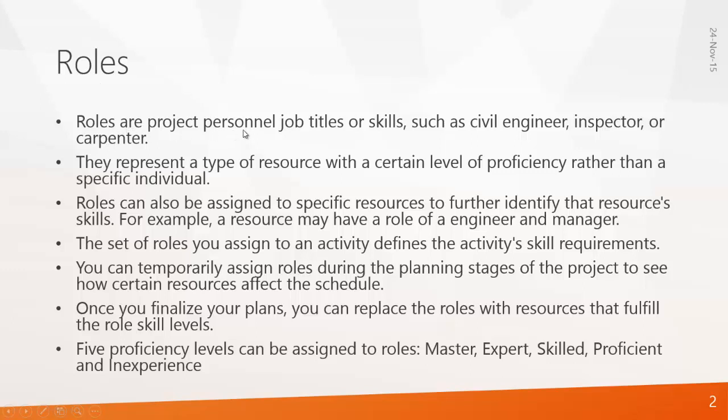So roles are project personnel job titles or skills such as civil engineer, inspector or carpenter. They represent a type of resource with a certain level of proficiency rather than a specific individual. Roles can also be assigned to specific resources to further identify that resource's skills. For example, a resource may have a role of an engineer and a manager.